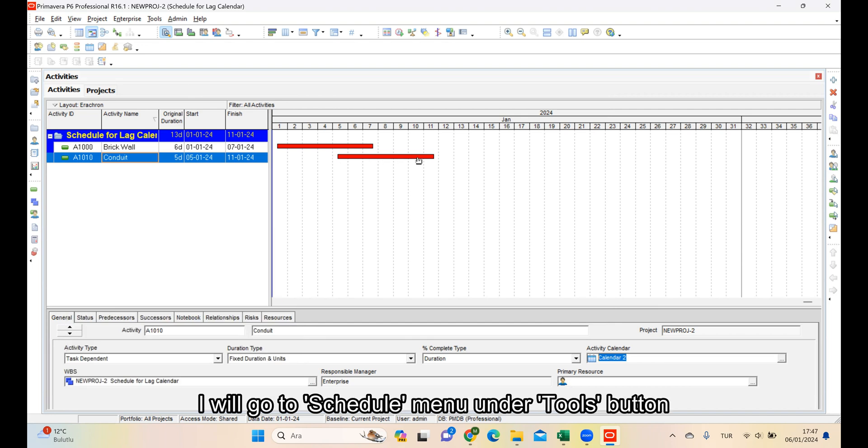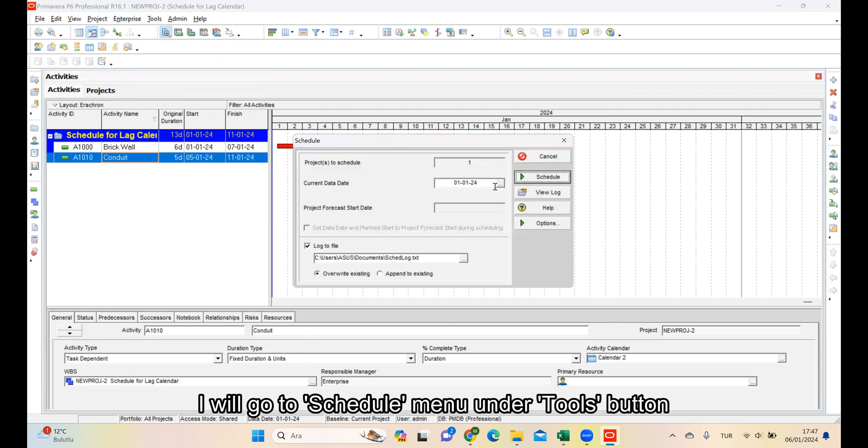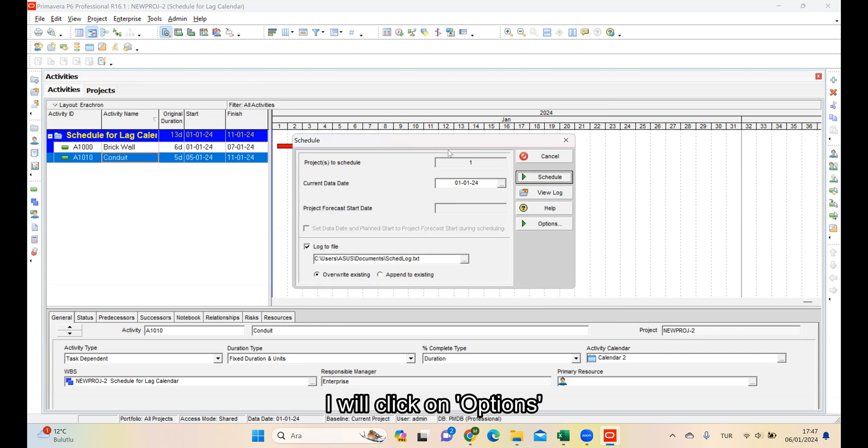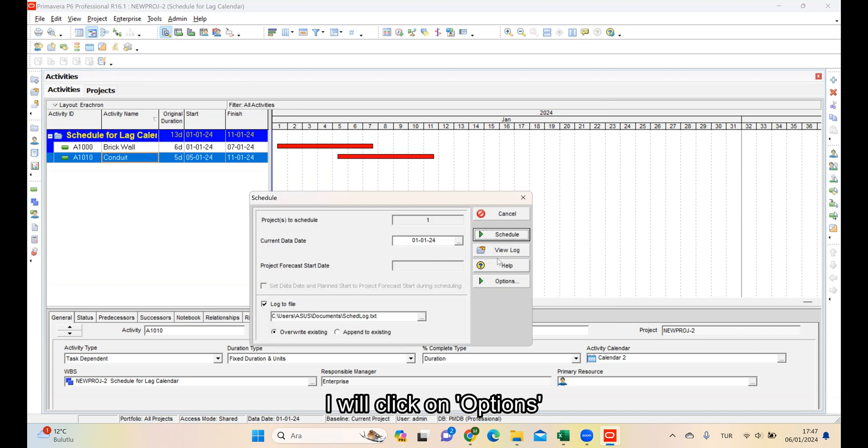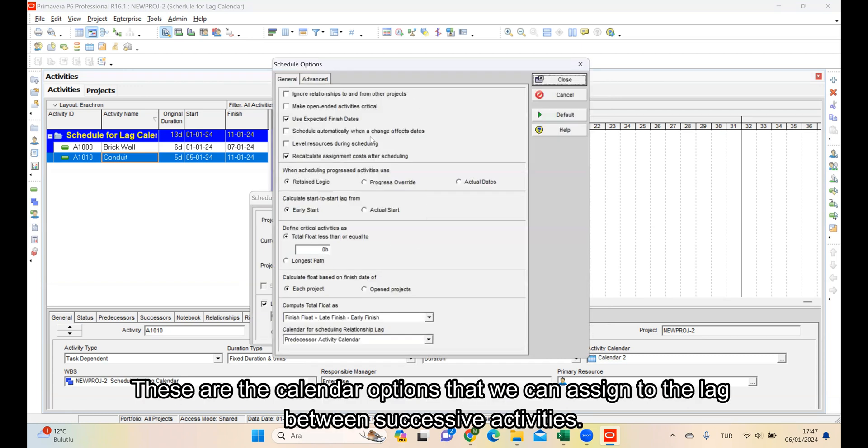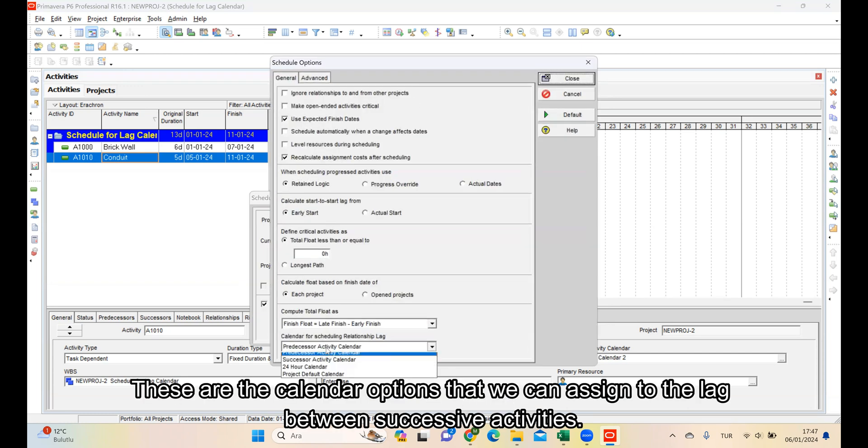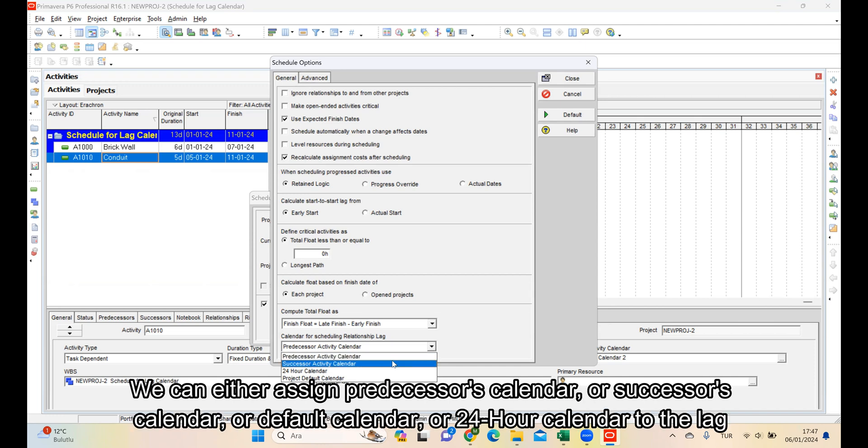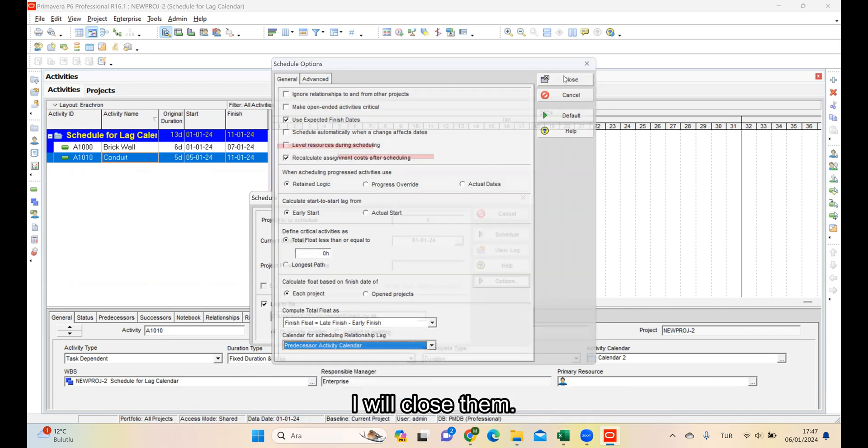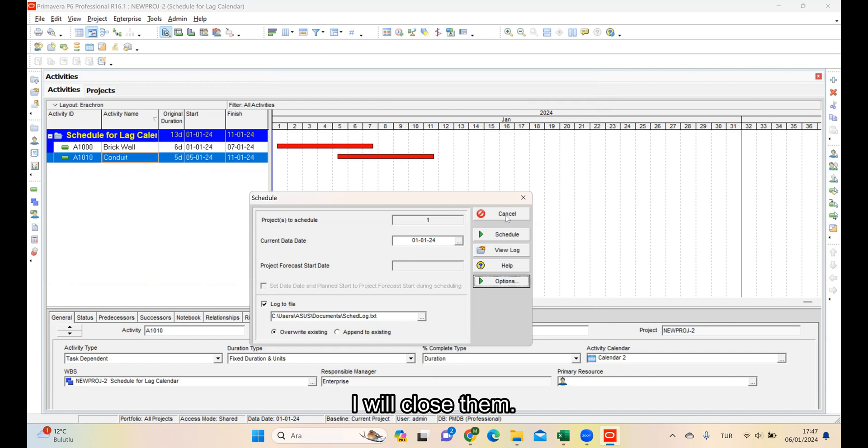I will go to the Schedule menu under the Tools button and click on Options. These are the calendar options that we can assign to the lag between successive activities. We can either assign Predecessor's calendar, Successor's calendar, Default calendar, or 24-hour calendar to the lag. I will close them.